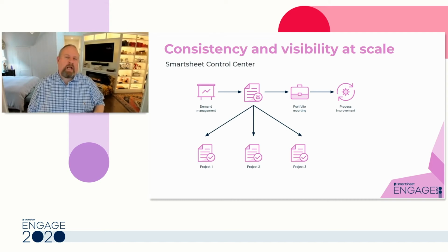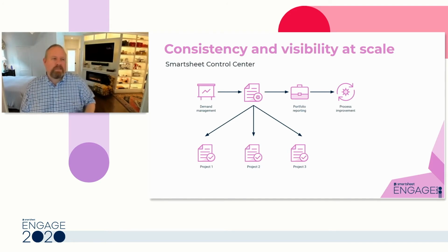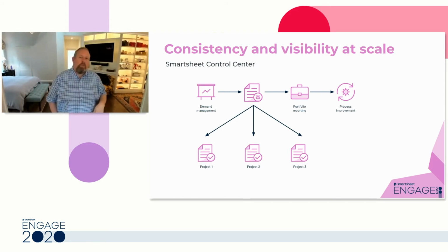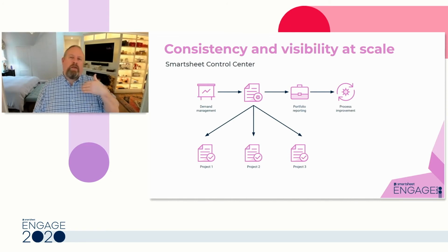Global updates allow you to make a set of changes in the master blueprint and have those changes be rolled out to the individual projects, updating them and allowing you to maintain consistency over time without actually having to do that manually all the time. So that can be an incredibly powerful way to turn yourself into a learning organization that is constantly adapting to change.